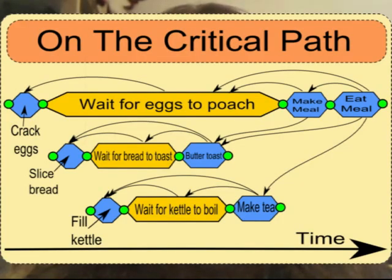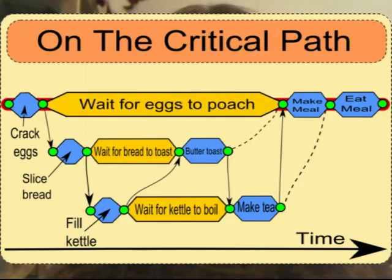The task scheduling diagram for this project initially looks something like this. The arrows indicate dependencies — later tasks are dependent upon the completion of earlier ones. Here is a diagram showing the critical path. Poaching the eggs is on the critical path, while toasting the bread and boiling the water are not. According to the diagram, the first thing one should do in the kitchen is crack open the eggs.